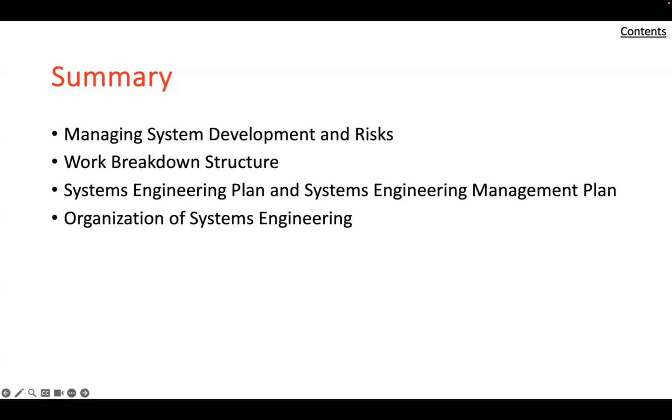The SEP, system engineering plan, often associated with U.S. government contracts, addresses the program requirements, overall technical approach, and metrics for the program. The SEMP implements all system engineering tasks. In the process, it defines roles and responsibilities of all participants.